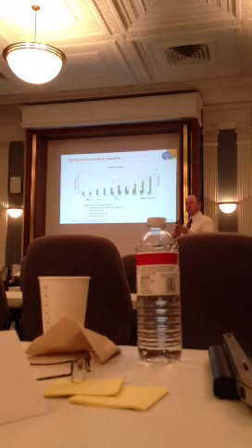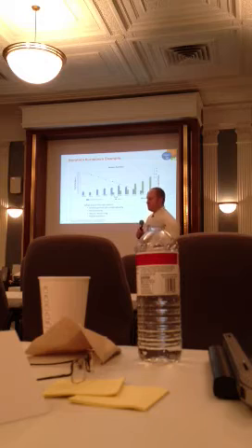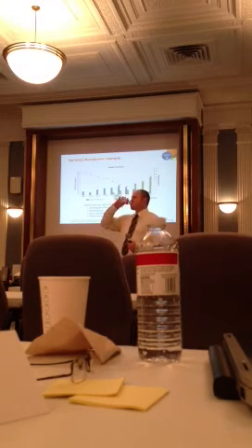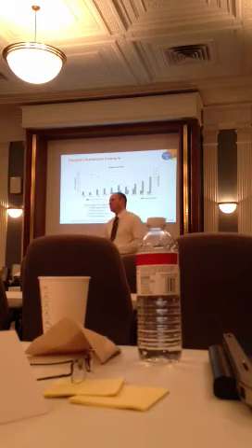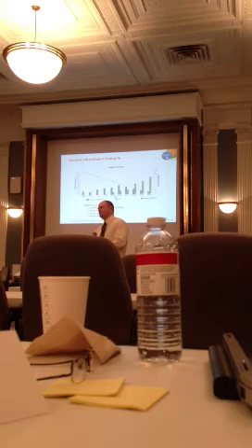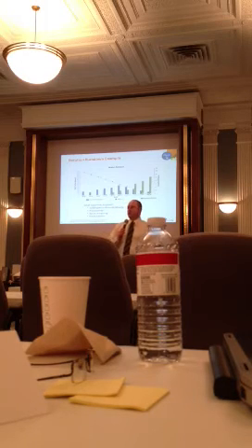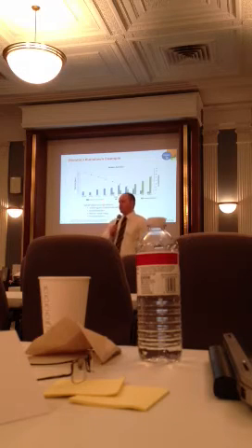Make sense? Right. Yeah. When you moved it back 3 days, thinking in terms of the team resources, were the resources engaged in breaking down the tasks? Were those resources now doing double duty to finish up the iteration that you're just finishing? They're 3 days from the end. Yep. So they're still working on user stories and tasks from that current iteration while they're breaking down tasks for the next. Yeah, they're doing both.